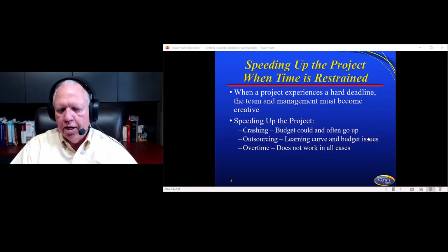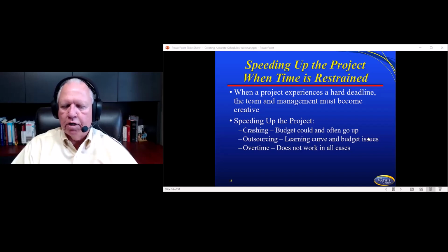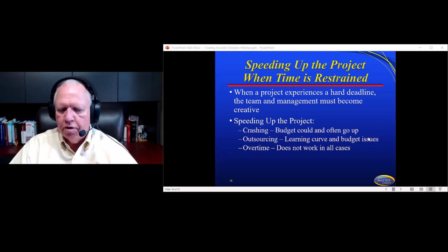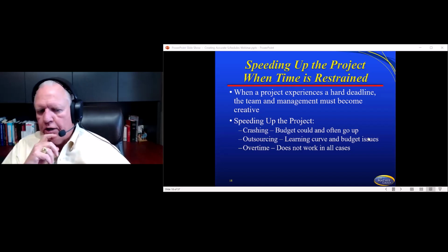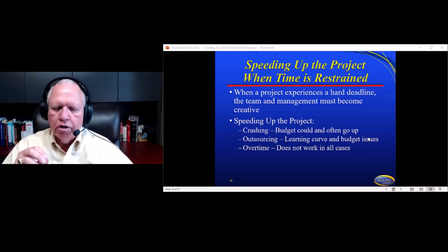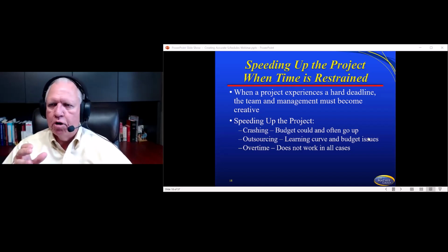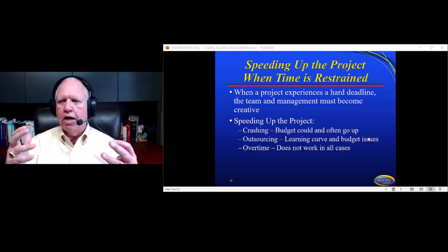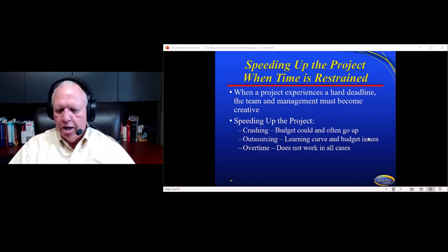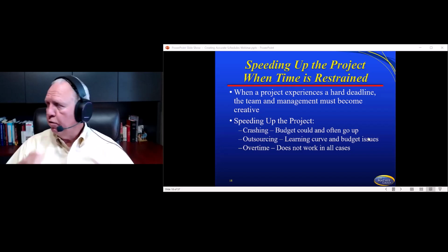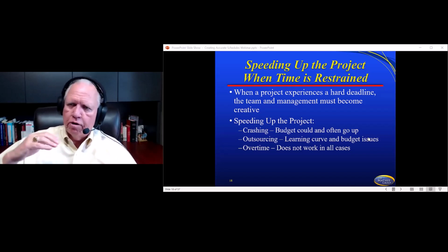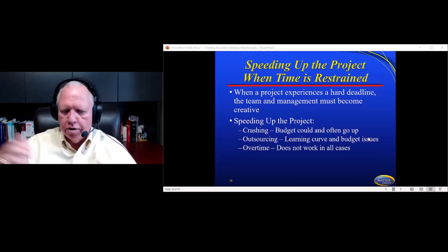Time is restrained. So when a project experiences a hard deadline, the team and management must become creative. And you've all done this. For example, crashing the project. The budget could, and often does, go up when we try to crash the project. As you know, crashing is defined as throwing more resources at something. And we do that. We throw more resources at it. And so what happens? There are no free resources, so it costs us more.